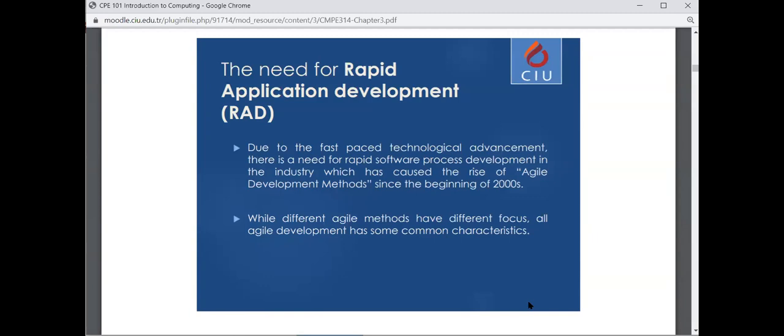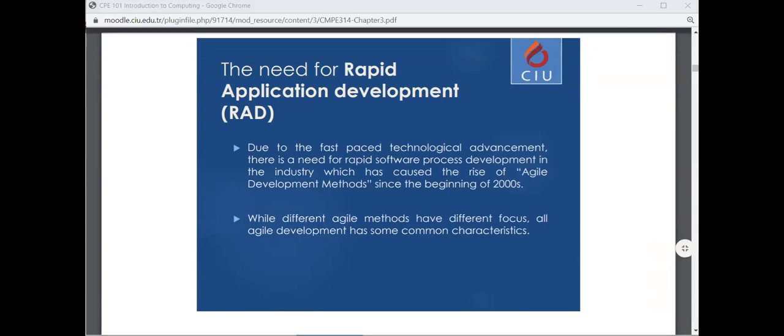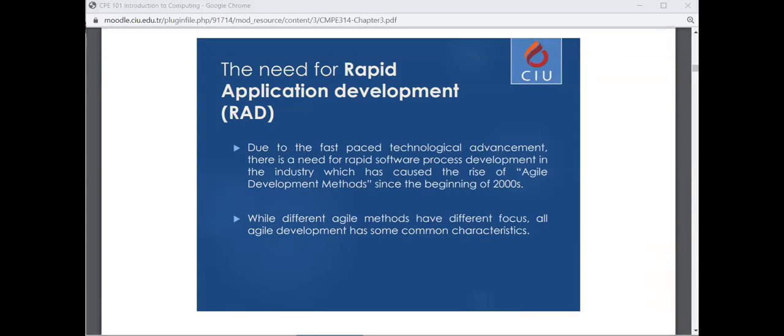So if you discover a requirement on your logbook that there is no way that you can complete in 3 weeks time, which is the next version, you just skip that. Okay, you don't waste time on it, and then you will release the requirement at a later phase, maybe in the 3rd or the 4th version, whenever this will be available.